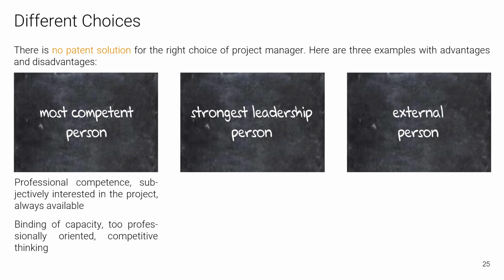If we take the most competent person, we have someone who is really interested in the project, who is always available, who brings a lot of technical and methodological competence. Of course, this also brings disadvantages. We have seen that a project manager has to invest a lot of time in management tasks. This leaves less time for co-development in the project. Then there are often problems with competitive thinking, because who should contradict the most competent person in the project? Thus, creativity and alternative solutions are unfortunately often prevented.